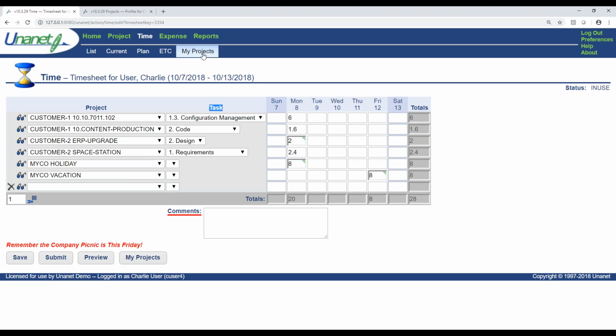So what I mean by that, you can have rules in here that for a specific project, let's say the period of performance is June 1st to October 31st, and effective November 1, you can no longer enter time. Same idea with an hours budget. Let's say you have a budget of 400 hours that you can work on this project, but on the 401st, you're going to get either a hard stop or a soft warning that says, you can save your time, but your project manager needs to go and update the period of performance or update the hours, give you more hours, and then you can submit that time.